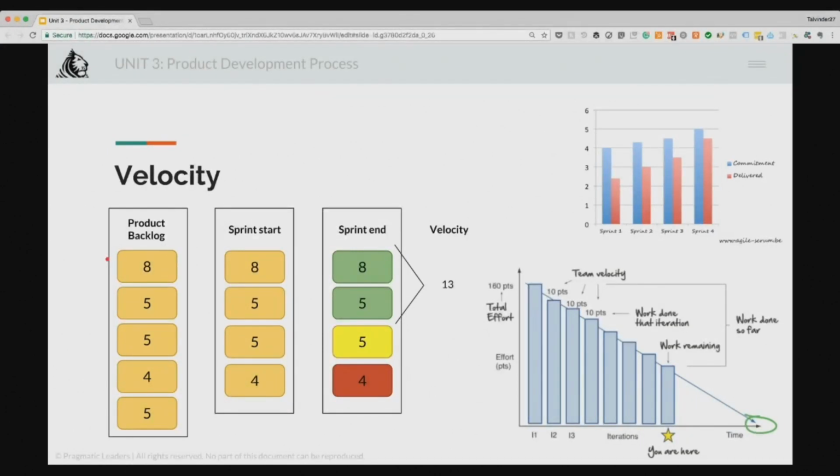So once you have this, the entire team's story points come together, and then you know, okay, in my team, a problem with story point 8 takes about 16 hours to finish, right?